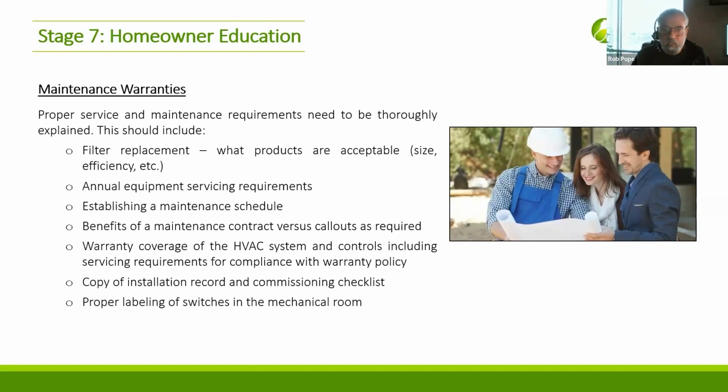You also want to make sure all the documentation is available for not just the homeowner, but for future technicians, so they can come and see what's in, what was the baseline that we started with, and what's different, right, if there's an issue. And you also want that paperwork for warranty.